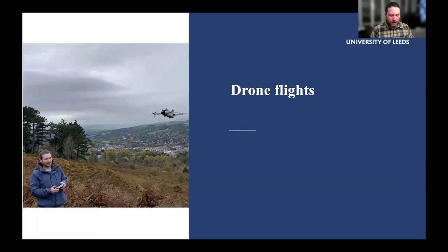Drone flights. I've been doing drone flights for various projects over the last, say, 5 to 6 years now, and they just take a lot of planning. You have to get landowner permission, for example. Bradford City Council is the landowner here, so we had to get permission from them to fly there. There was a big worry about ground nesting birds, and our filming period could have been in the time that they would be doing that, and we just wouldn't have been allowed to fly if that was the case. But fortunately, they allowed us to go up.